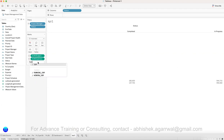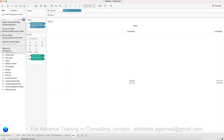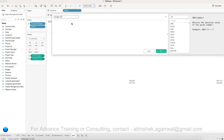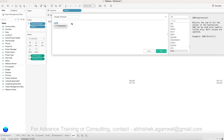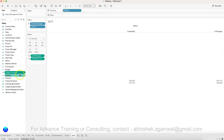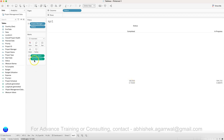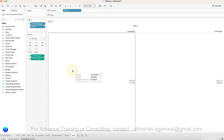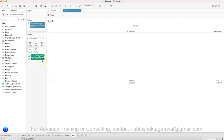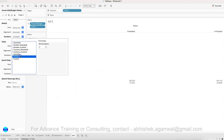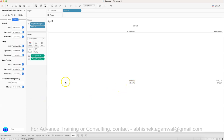We need budget utilization, which is based on expense divided by budget. We can create a calculated field for this. I'll go to Create Calculated Field and name it 'Budget Utilization' — the formula is SUM(Expense) / SUM(Budget). Click OK. Once you have this, drag budget utilization to the view and you get 75%. We then need to format it as a percentage, so it shows as 75.42%.